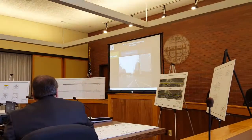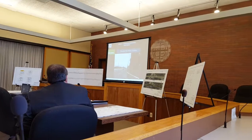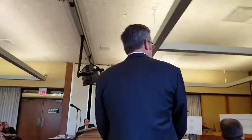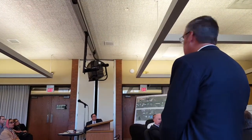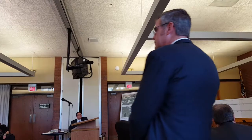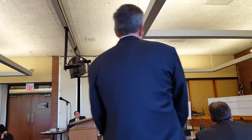The other issue I mentioned before is the condition of the shoulder pavement. Typically, the shoulder pavement's not as thick as the mainline pavement, so we did a pavement evaluation along all of South Brunswick to identify those sections of the shoulder that couldn't support traffic. And what we actually recommended are several sections, actually one section is part of this project, that we're gonna have to mill and resurface the roadway 5 inches deep in order to provide enough structural support for the traffic.